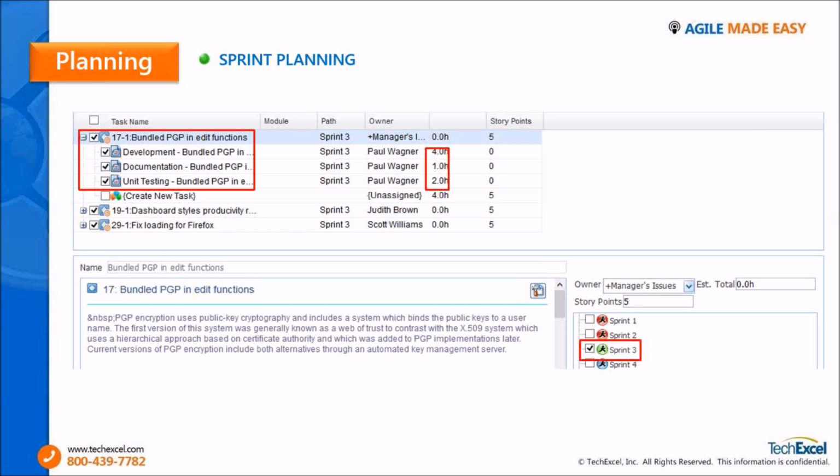In terms of the sprint duration, after a lot of thought and a lot of experience, we adopted a sprint duration of 2 weeks. We started off with a very aggressive schedule of just 1-week sprints, but we realized that in 1 week, even though the developers were able to implement the features, we didn't have enough time for QA to run the tests and for bug fixing. So we decided to try out a 3-week schedule.